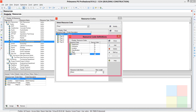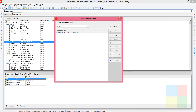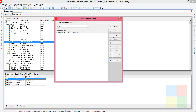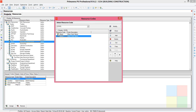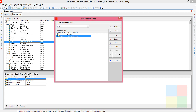Name it 'Level', then save and close. You'll see it appear. If you don't see it, click the dropdown and select Level. Then click Add two times because we have two values — Junior and Senior. I'll name them 'J' for Junior and 'S' for Senior. Save and close.